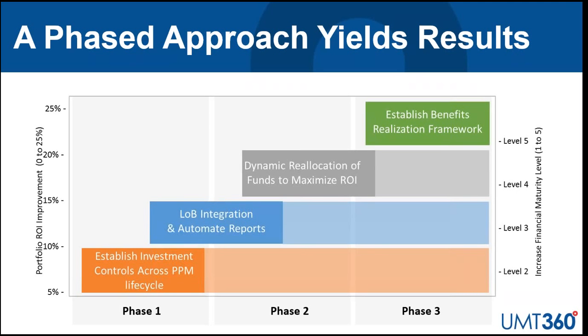But the thing about dynamic reallocation is it's only as strong as your forecasting capabilities. So there is a cultural change to make with the project managers in terms of expecting them to be able to freely request more money, but by the same token actually start to freely give back money so it can be reinvested. So without that effort to actually change that mindset in terms of forecasting behavior, dynamic reallocation is kind of an exercise in futility.